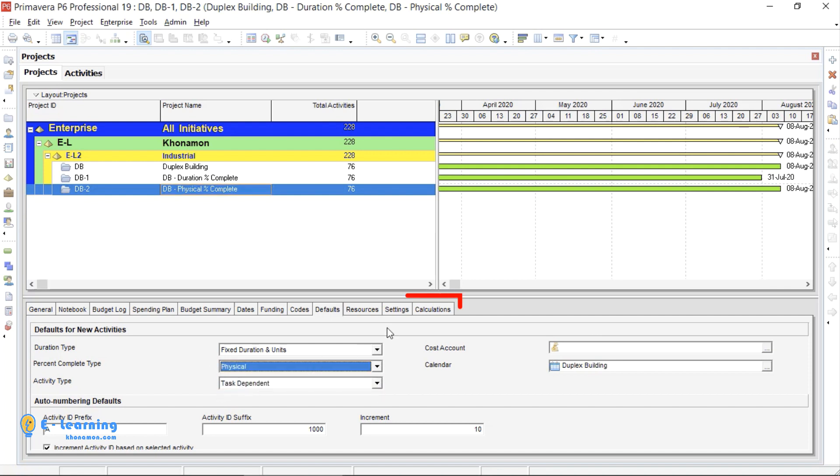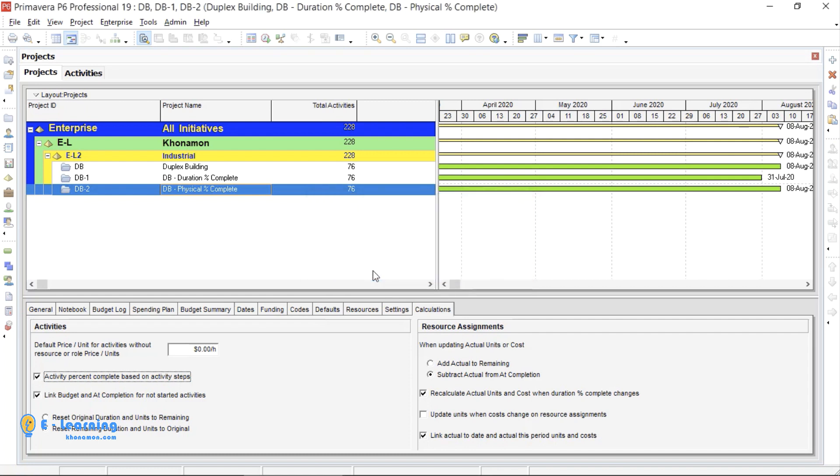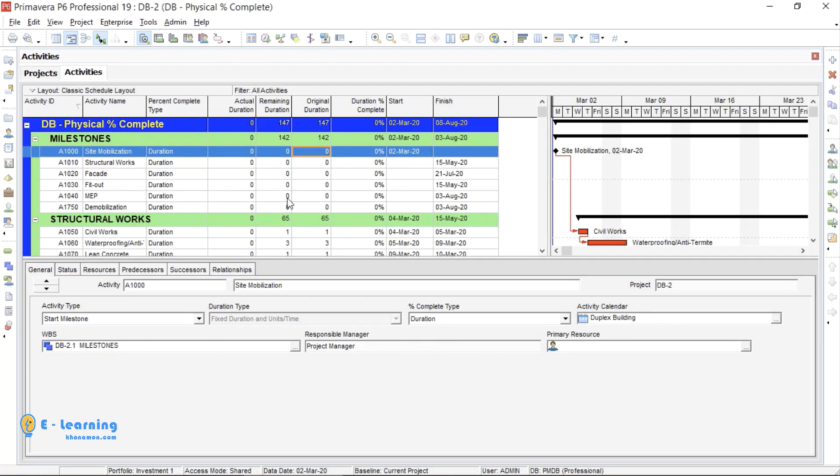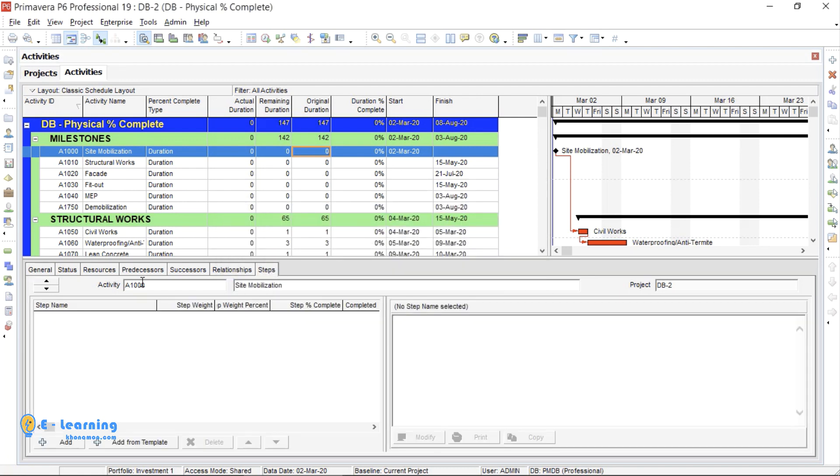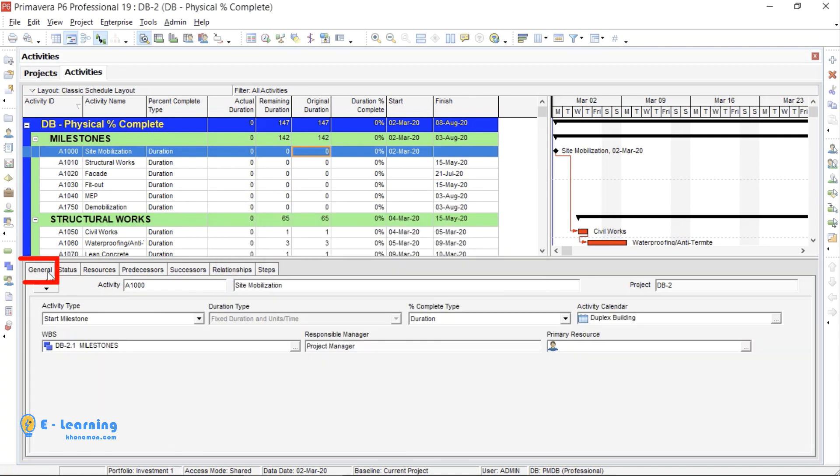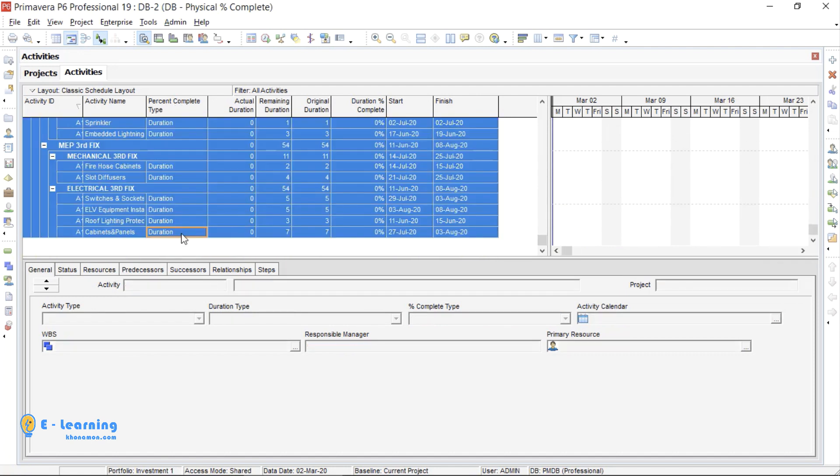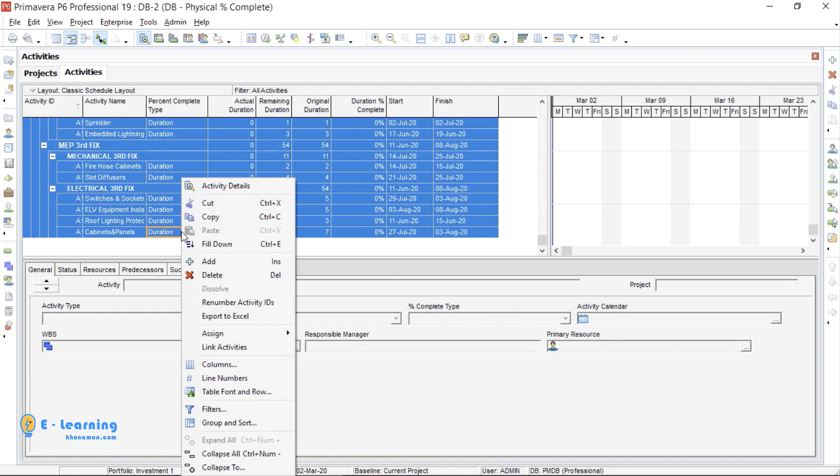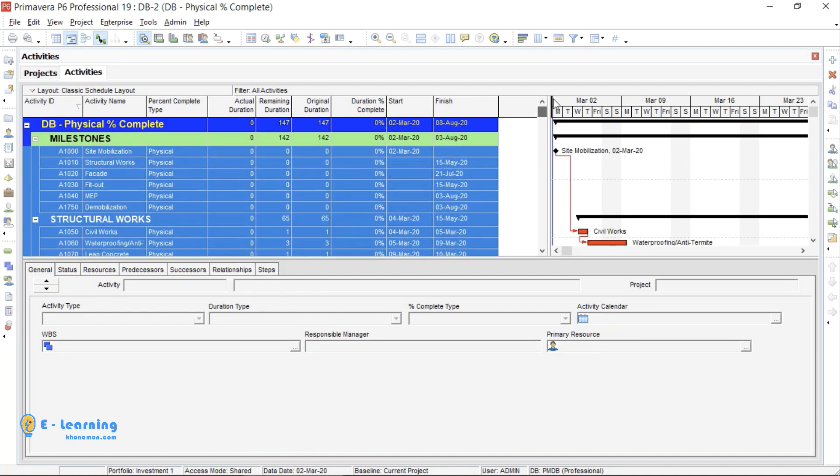Then go to Calculations tab. In the Detail window, click on Activity Percent Complete based on Activity Steps. On Detail window, right click Customize Activity Details and select the Steps. Go to General tab, Percent Complete Type and select Physical. If you want to use it for all activities, from Percent Complete Type column, with help of Shift, select and right click and fill down. You can change all together into Physical.